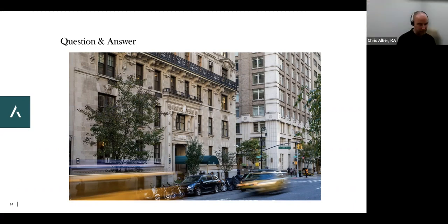For me, I'd say it's as simple as, provided that you're following all the rules of the building and of the city, and you're following all the proper procedures and doing all the proper paperwork, and you have the proper insurance and that sort of thing, for me, it's your ability to make decisions. I think the hardest part I've always experienced as an architect in working on a project is that people have a hard time making decisions. And that's the thing that slows down the process the most. If you don't know what you want, or you are unable to make decisions, I would say that's going to be the hardest part.